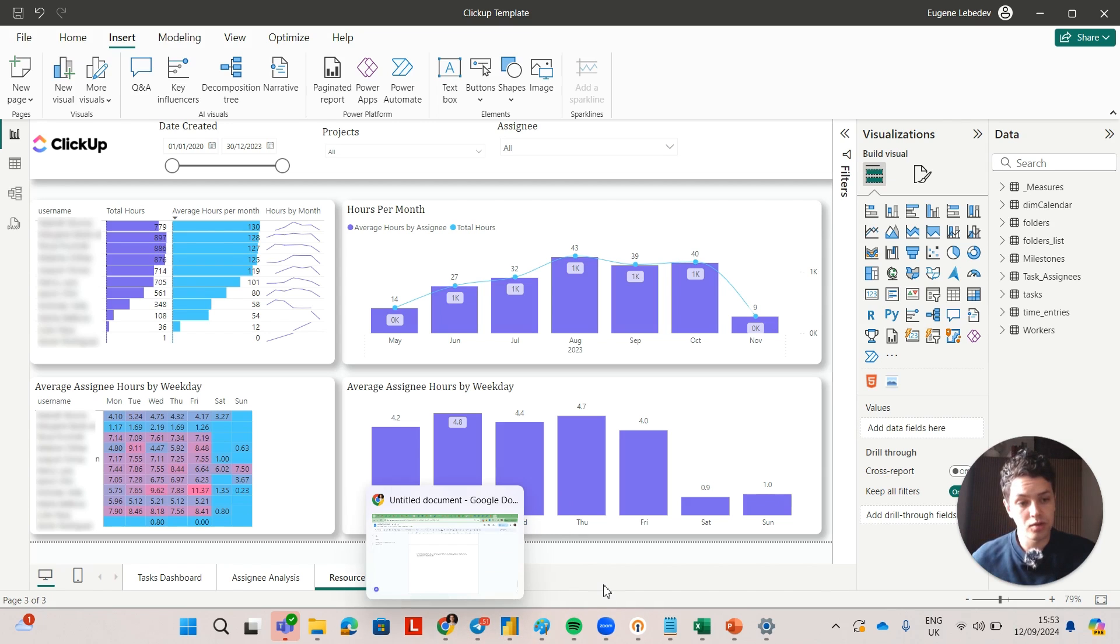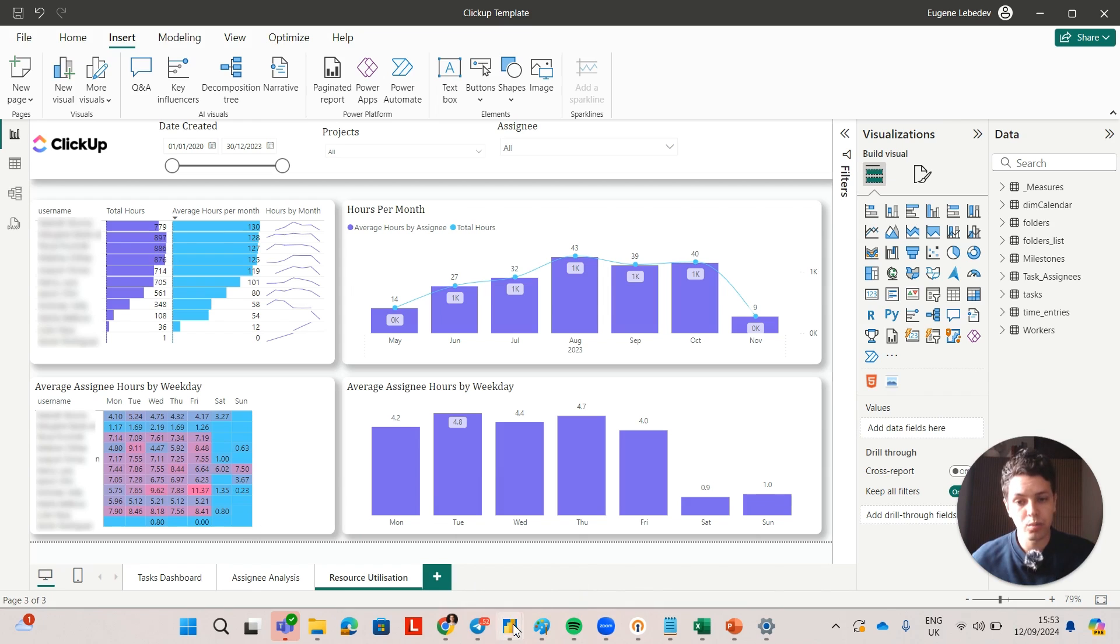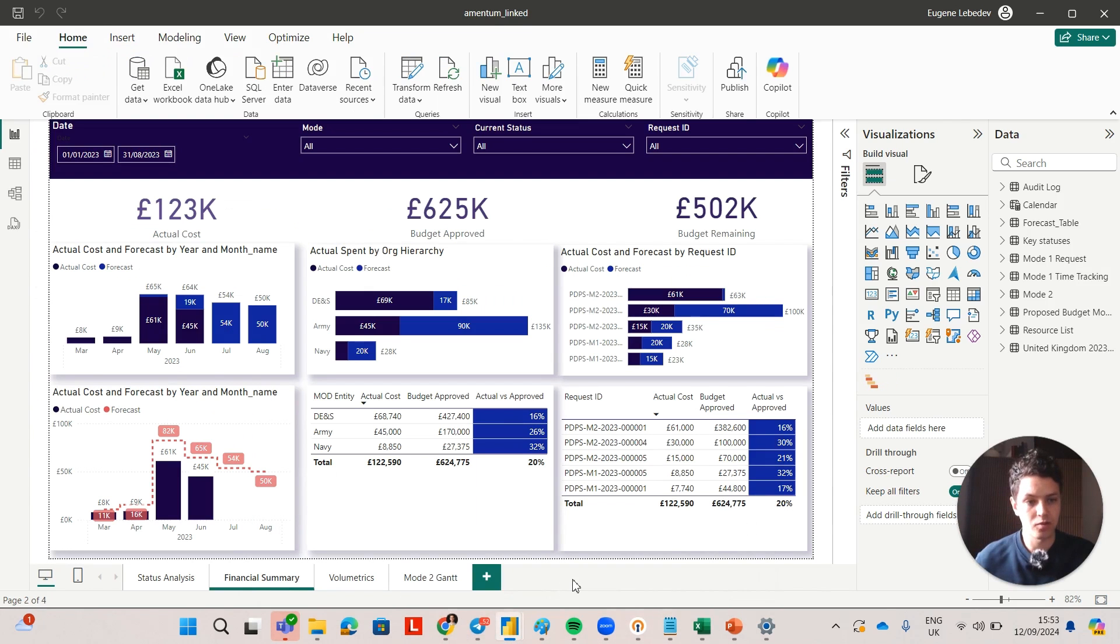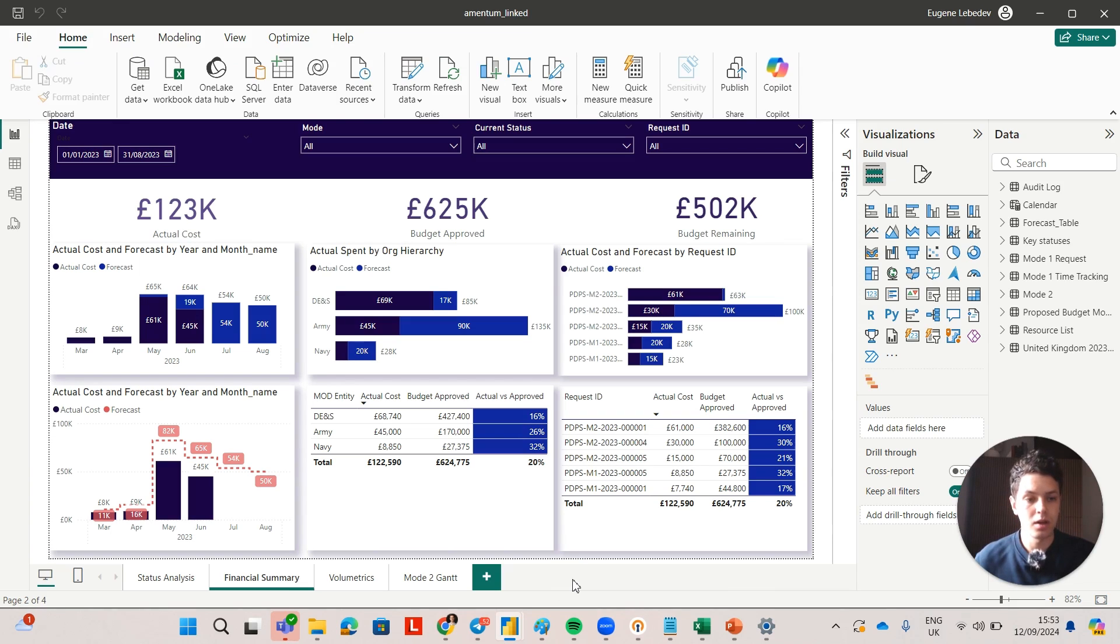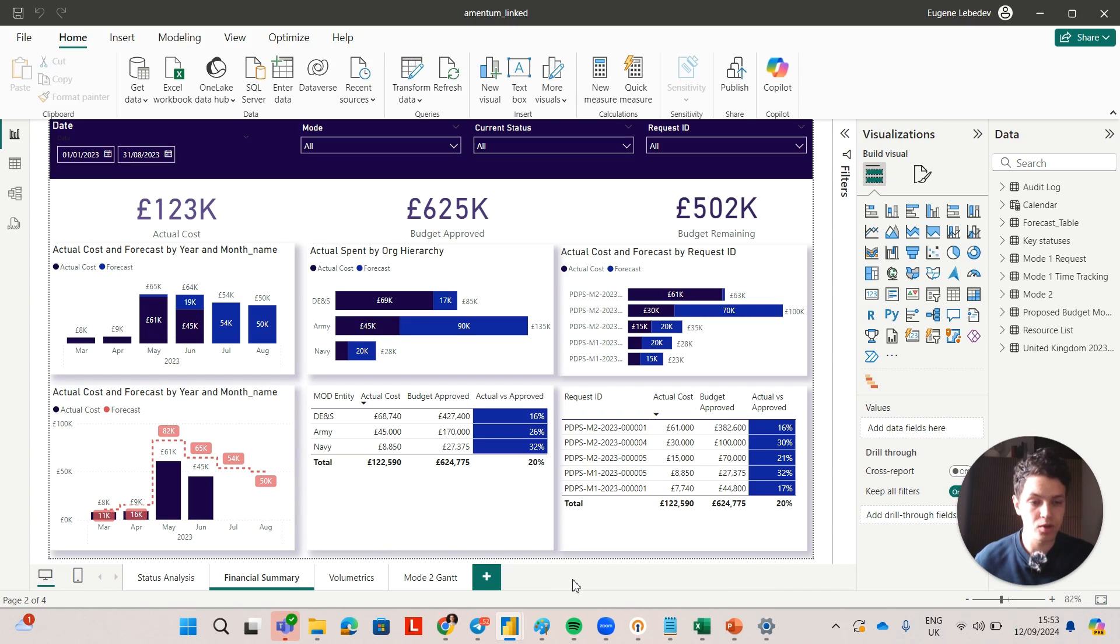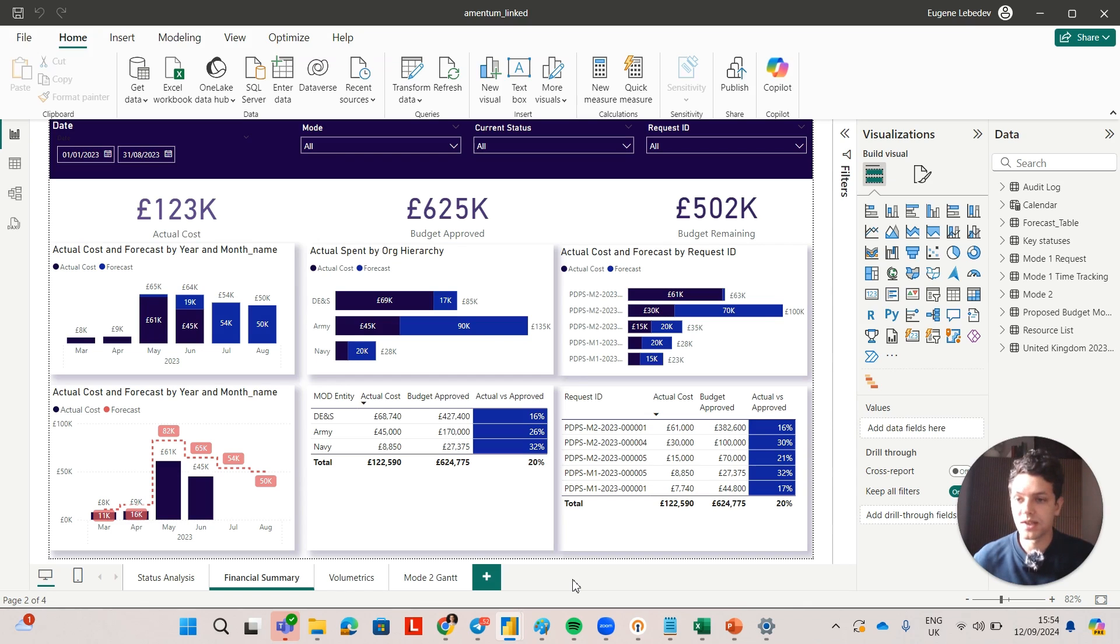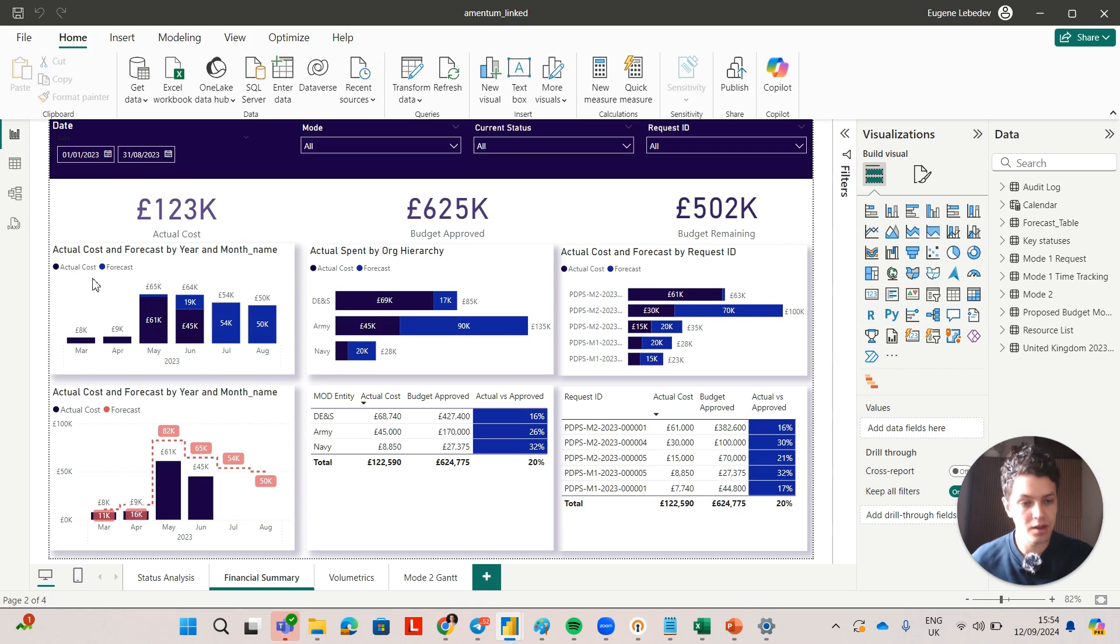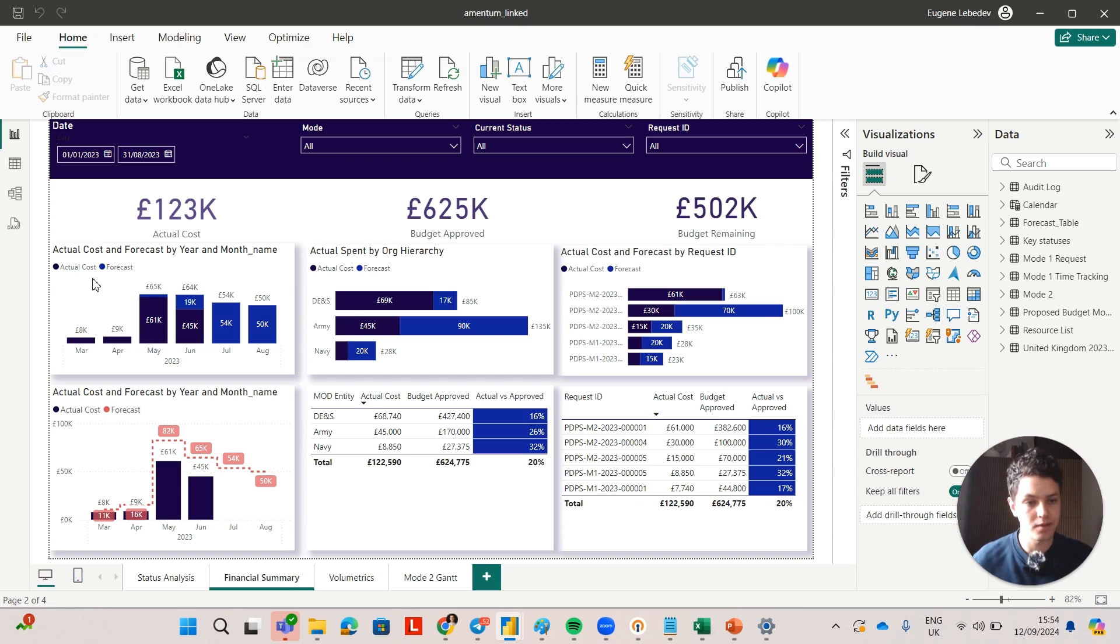So far we've talked about tasks and hours but one very important aspect of project management dashboards is budget. Again, this is important if you are reporting to C-level executives because they want to be in control of the money spent. Something you can do here is to show the actual cost and the forecast for every month that your projects would be running, and this way you can help management anticipate the expenses every month. So this just gives some peace of mind in terms of we know how much we will spend next month and what this will go to.